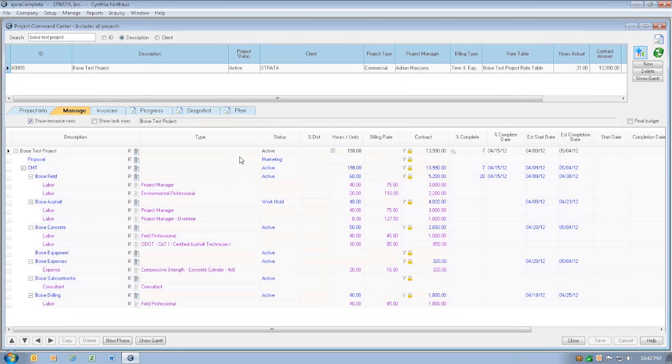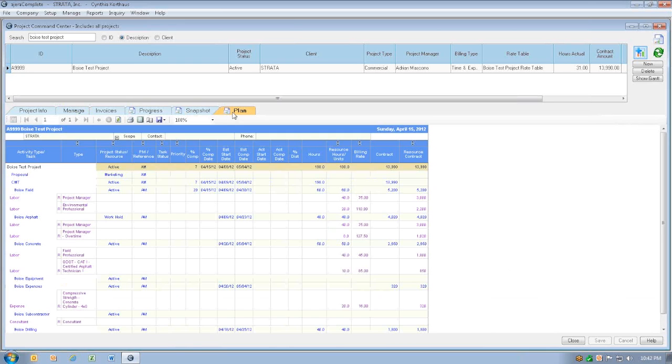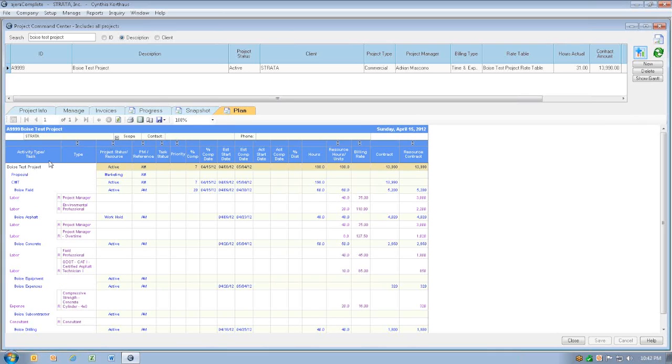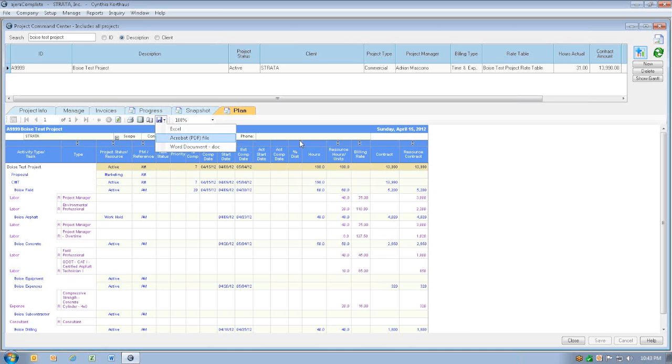The third report we're going to look at is our plan. This plan tab is a good printout to compare, to give to your client, to keep in the file. This is basically your whole entire fee estimate. It's essentially a mirror image of your manage tab, but this tab can be easily printed or exported to a PDF or Excel if you need to do further derivations.